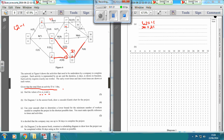Y: what's the latest this one can start so that this one still gets done by 30 and this one still gets done by 17? In theory we could start M at 24 and it can still be done for 30. However, if we start this one at 24, this dummy arc with a weight of 0 won't be done for 17, which is the latest that this one can start. So in order to get this one done for 17, this one also needs to be 17. So Y equals 17.